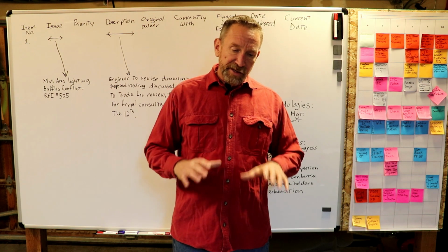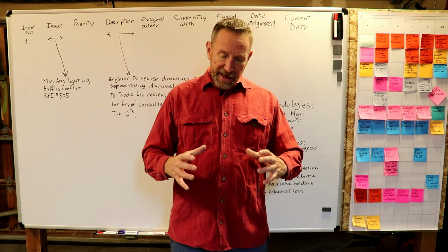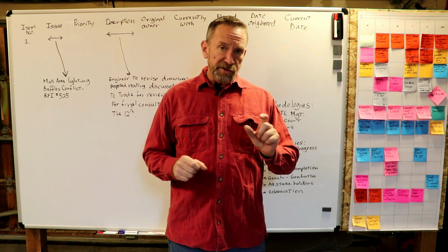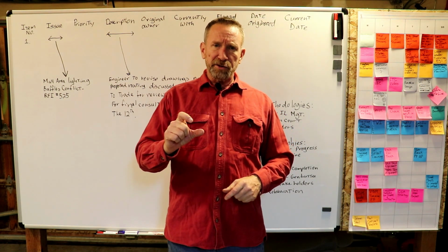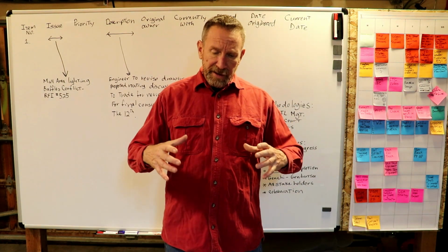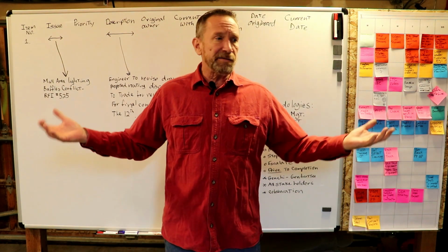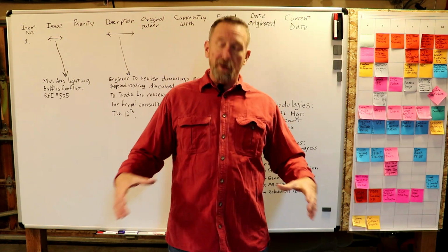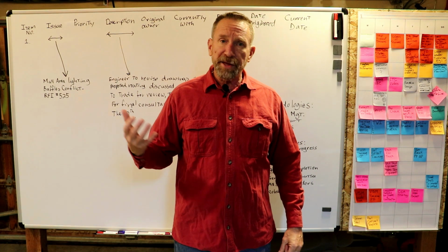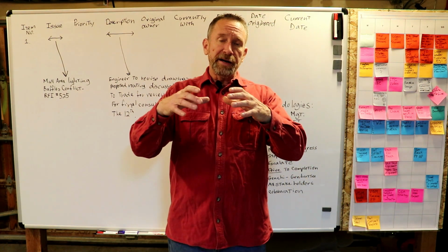You have to understand that most processes can be handled in escalation at the lowest levels with the PM, the superintendent. Sometimes we have to get the directors and some of the senior management from the trades and the architects together, and then every once in a while something's big. It's a $500,000 issue, and it's going to get escalated up to the big guys, or somebody went bankrupt. You know, something big happens, and it will require escalation.